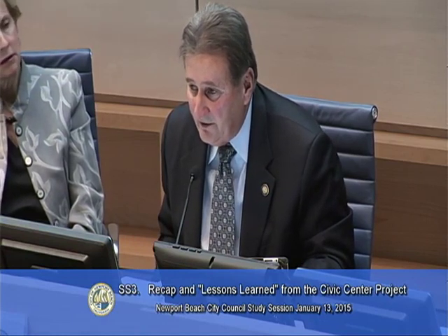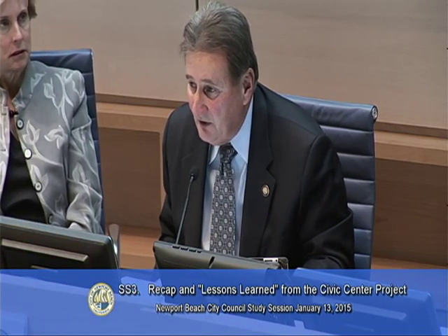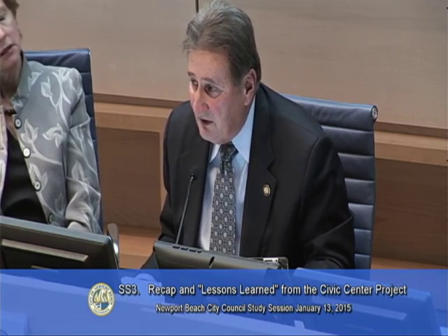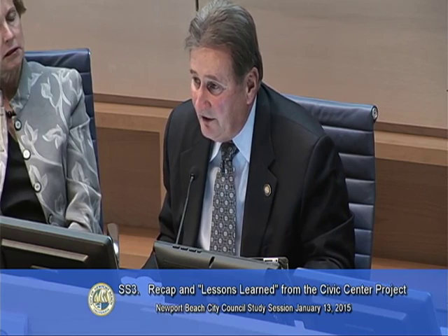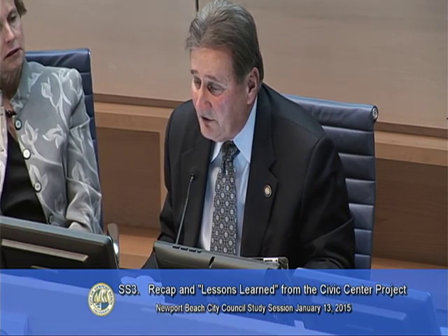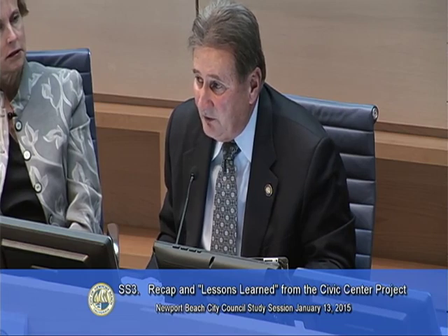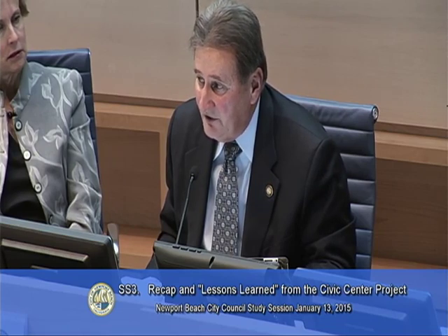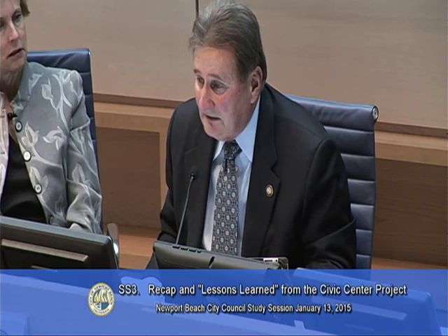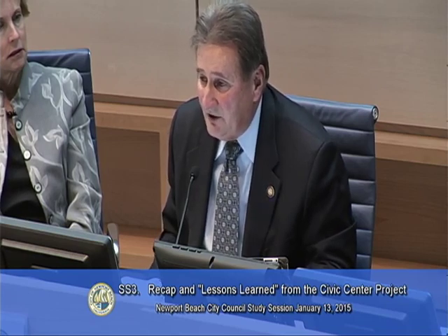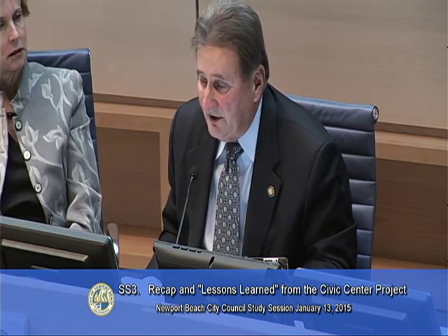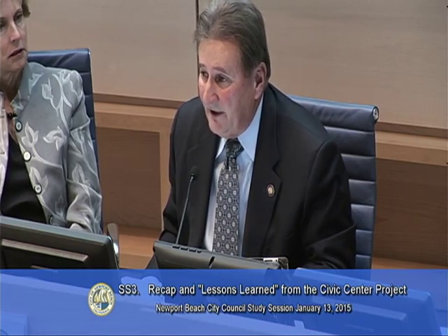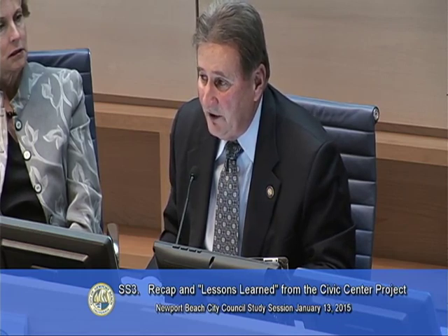I just want to point out that one of the major jobs of the building committee was to do what's called value engineering, and most of our task going through the review of this project was continually to take a look at all the different choices we had in terms of materials and getting the materials that would provide the best value to us in terms of long-term maintenance at the least amount of cost. And we spent a lot of time going through and evaluating just a lot of different things, whether it was ceiling materials, flooring materials, whatever, to make sure that we got the best value, but we also did not just buy on price alone so that we would have to replace these items in a very short period of time.